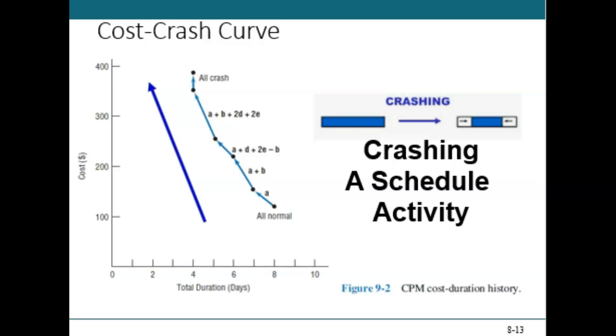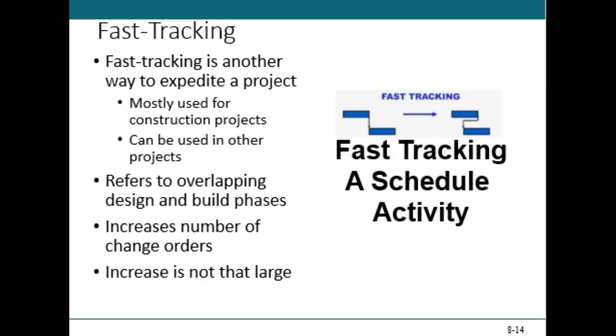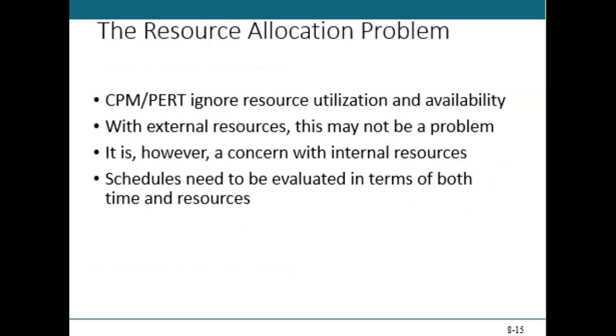Okay, so picking up again where we left off, we just finished the cost crash analysis and looked at the cost crash curve. Now we're just going to touch a little bit on fast tracking. So again, fast tracking is that technique for activities that would have been performed sequentially, one after the other in your schedule, using the original schedules performed. Now we're going to do it in parallel. In other words, fast tracking a project means the activities are worked in a simultaneous fashion instead of waiting for each piece to be completed separately.